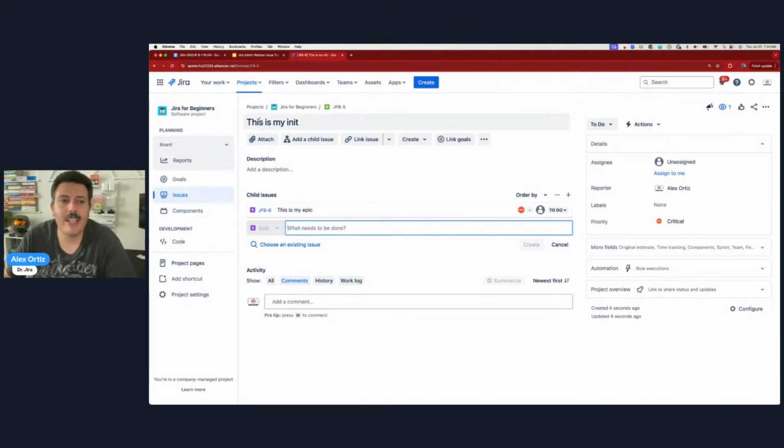If you wanted to add a child to an initiative, you had to go in reverse. You had to go to the epic and give it the parent. And that was like the only way. It was very backwards. But now, fortunately, Atlassian has finally caught up and standardized this, and these issue types will respect that parent-child relationship, and it knows who the parent is based on that hierarchy number. So that hierarchy number is very, very critical, very, very important.